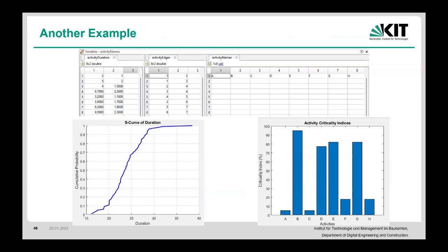So coming back to your question, is it better to do it this way? Yeah, because now you can simulate a few times, right? However, at this level, we still need to provide it with the edges, so we need to draw the network once at least. But the rest of the things, such as simulations and the mean, have now been taken care of. You can now get your S-curve and your critical activity.